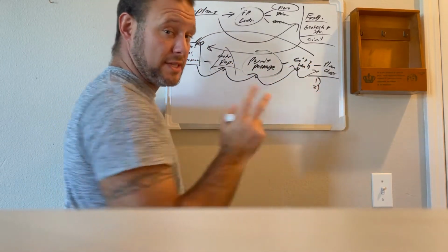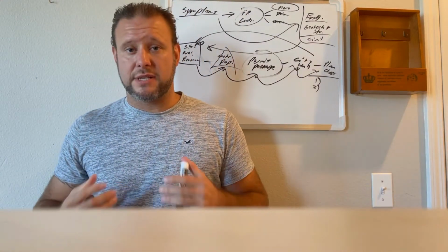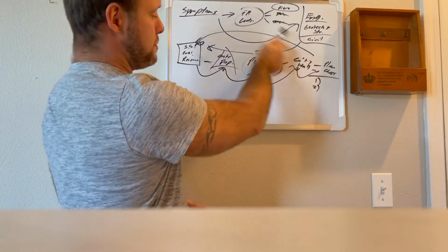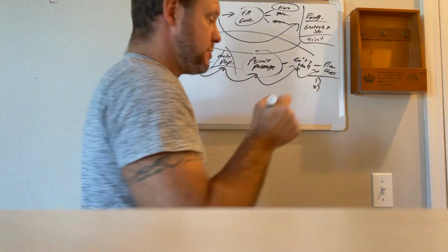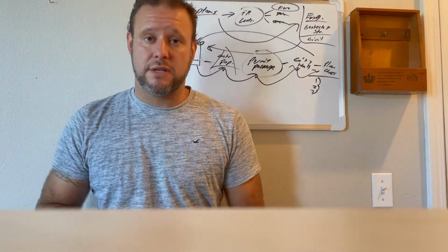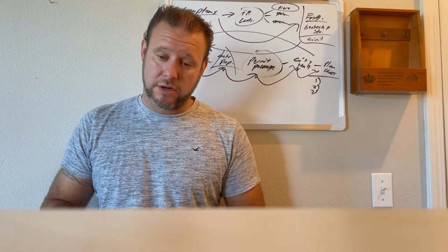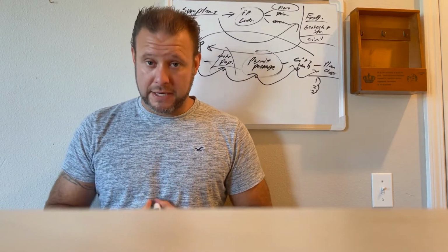He might say it's wrong a second time, but if twice the plan checker says something is wrong with the plans, that warrants a phone call. You do this process again. Bop, bop, bop, bop. If you get to a third round, I usually recommend an in-person visit with the homeowner, with the contractor, with the engineer, and with the plan checker. It is just to get everyone on the same page.